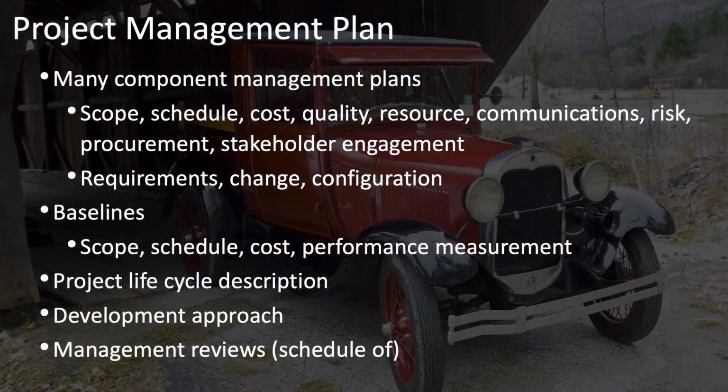The key points you need to remember about the project management plan are that it contains many component management plans from the other knowledge areas and elsewhere, including scope, schedule, cost, quality, resource, communications, risk, procurement, and stakeholder engagement. In addition, management plans for requirements, change, and configuration.